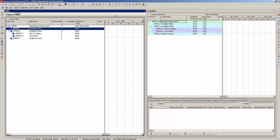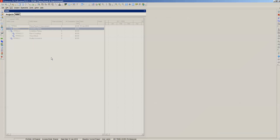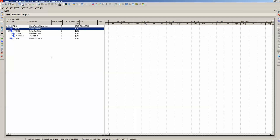To go back to the single WBS view, select View, Tab Groups, Merge All Tab Groups. The WBS is an important scheduling concept to understand. Focus on breaking the deliverables down into component product elements that are small enough so that work activities can be clearly defined and assigned to these elements. The WBS elements are your deliverables and help define the necessary activities. Creating a WBS at the beginning of the scheduling process, as we do in Primavera P6 Professional, helps keep your eye on the ball and maintain a proper product focus throughout.